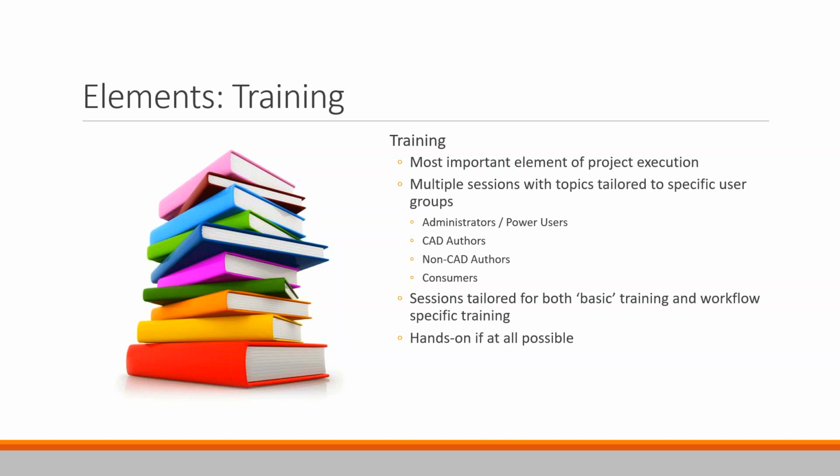So, maybe the week before or a couple weeks before you go live, get them basic training, and then, either just before or right after the Vault becomes available for them, get them some training on, okay, here's how we take one of our drawings, put it in the system, release it, revise it, etc.